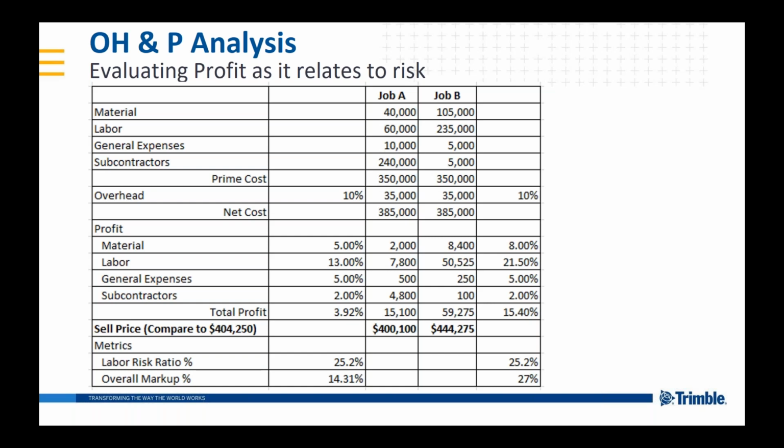Some of them that come off the top of my head would be something like, if I was working in a ditch, so I'd qualify that as a below grade factor. Again, you have to understand the basic assumptions of the estimating system that you're using, or the estimating labor units. If your basic assumption says that up to 4 feet deep in an excavation is included in my normal labor units, then I wouldn't apply a factor. But if I was deeper than 4 feet, I would want to apply a factor. I would say maybe 2 to 4% per foot below that 4 foot would be something that I would add.